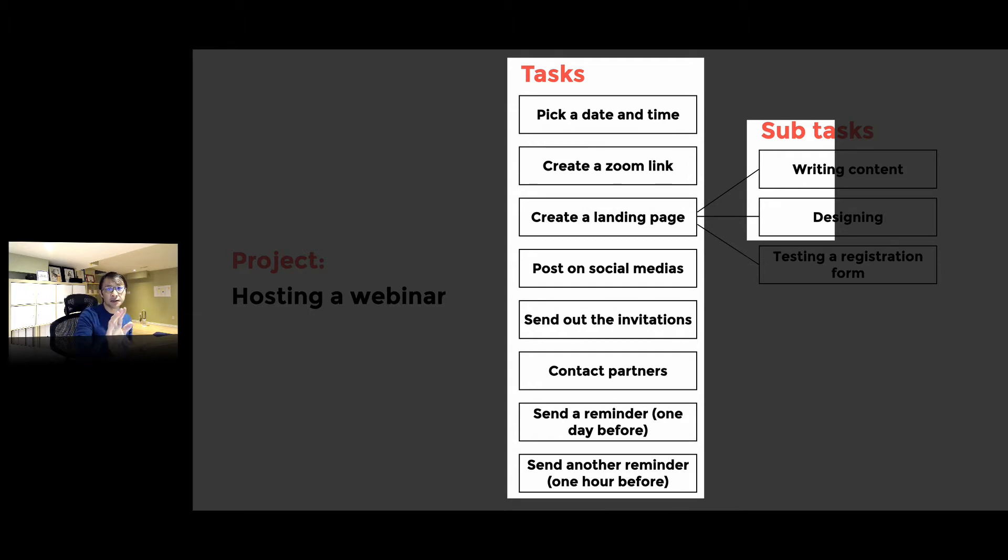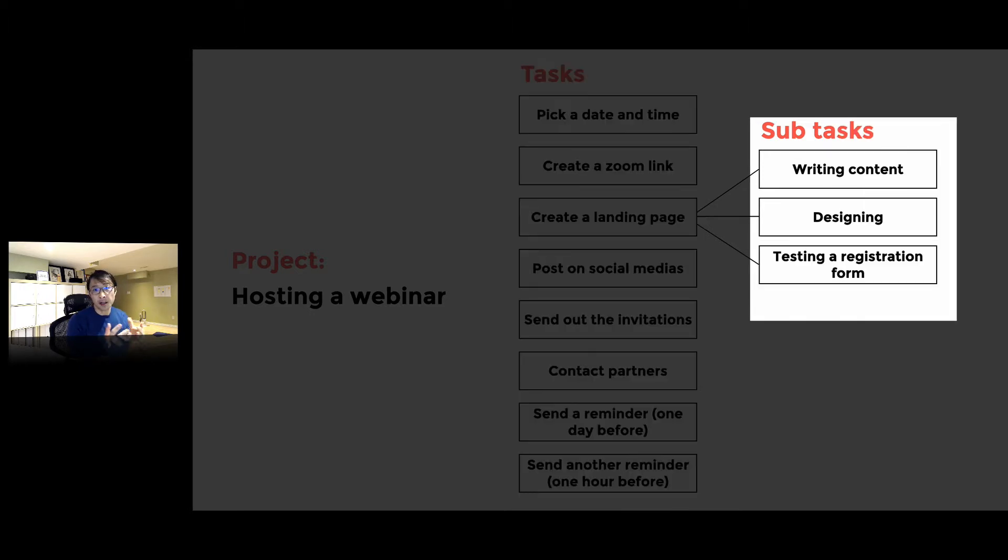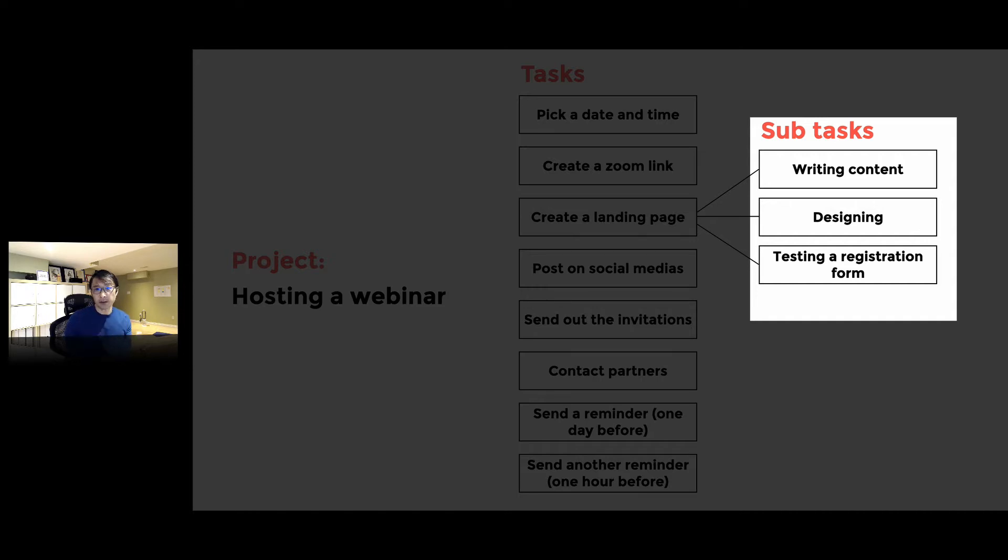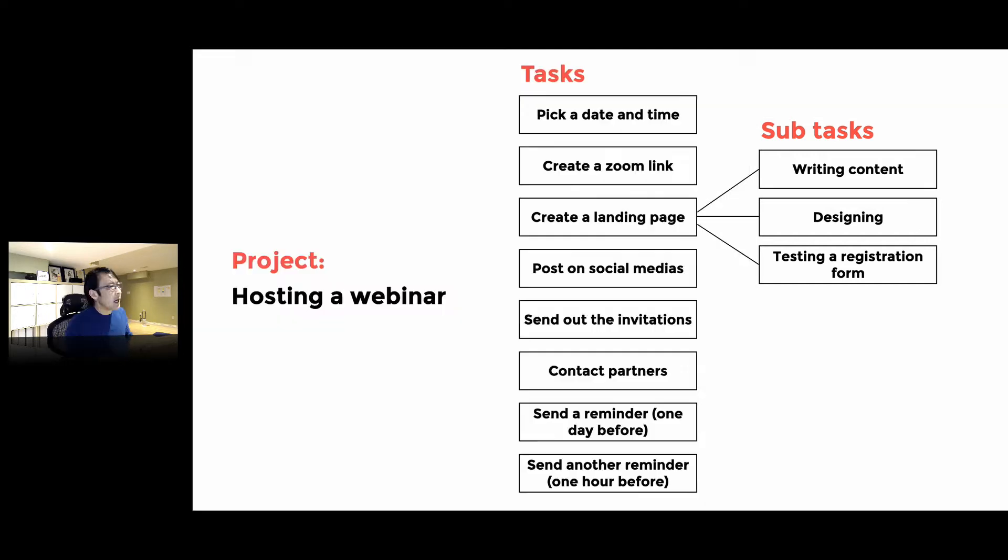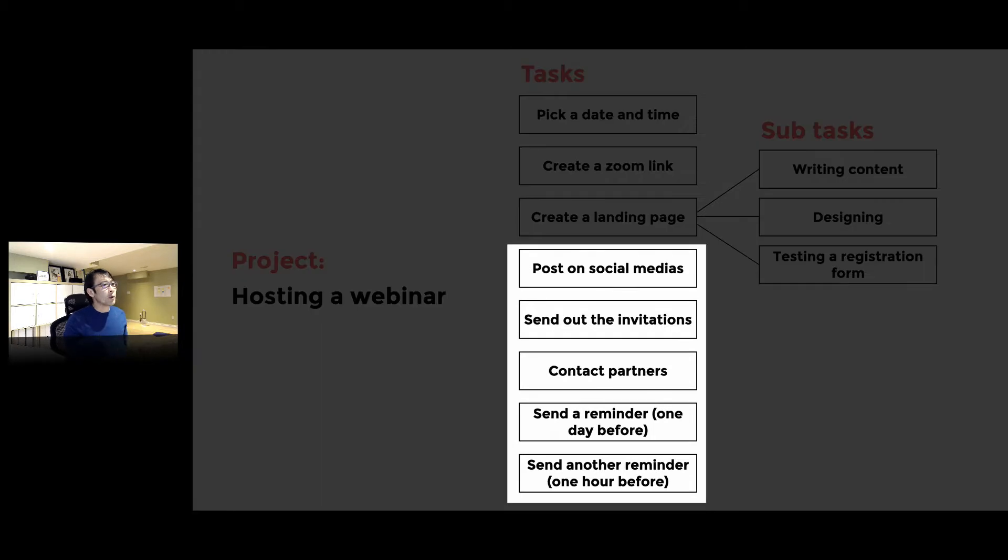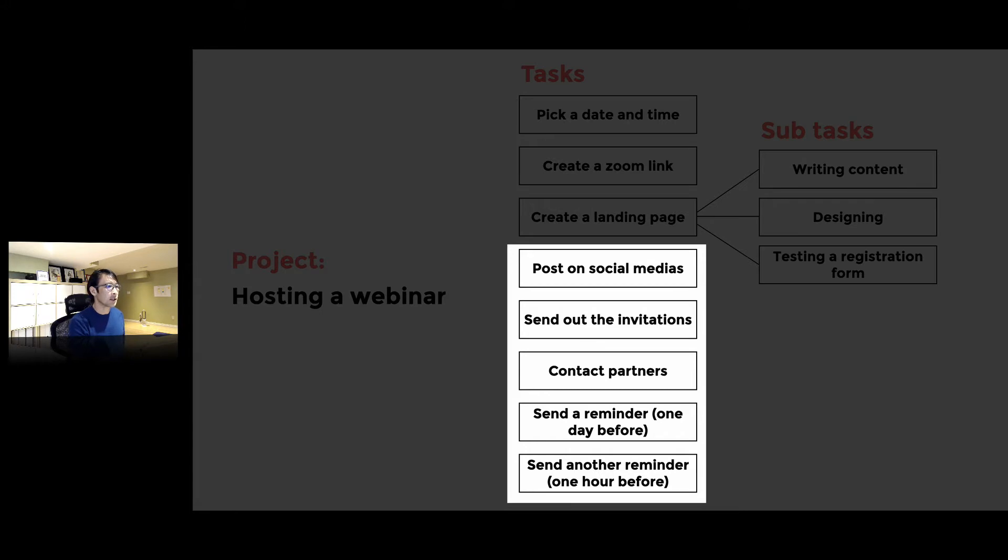The subtasks for that are writing content, designing the landing page, building the registration form, testing the form, and then posting on social media to promote the event and send out the invitations.